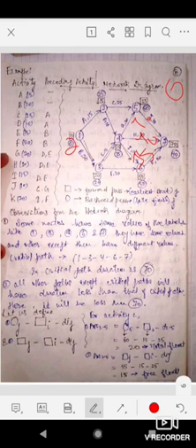20 minus 20, it is 0 here. 20 minus this project duration 20, we got 0 here. See, here we have 60. 60 minus 25, it is 35, but we will take minimum of those because two activities are coming here for backward pass. So here we have 35.